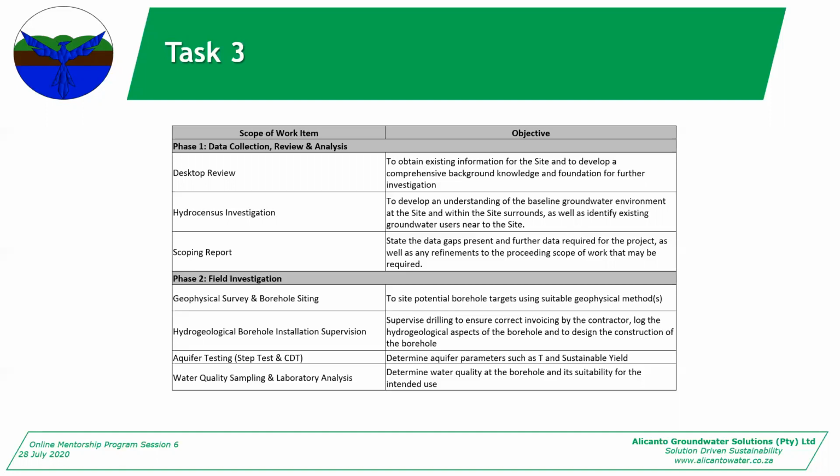In phase 2, the field investigation, assuming we can do geophysics, we do a geophysical survey and borehole siting. You do the most suitable geophysical survey based on the geology, and then the objective is obviously to site potential borehole targets. Then you go on to do the hydrogeological borehole installation supervision, where you supervise the drilling to ensure correct invoicing by the contractor, and also to log the hydrogeological aspects of the borehole